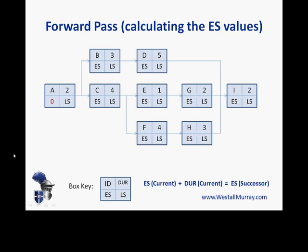Then we calculate the early start of B and C, because those are both next activities. Using the formula — early start of A added to the duration of A — gives us two. So for B we get two, and for C we get two. Because activity A starts at zero and lasts two days, the earliest that B and C can possibly start is at day two. We can move across the network doing D, E, and F the same way, and fill in values for G and H. But when we get to I, we have three paths that feed into I — in other words, a join.